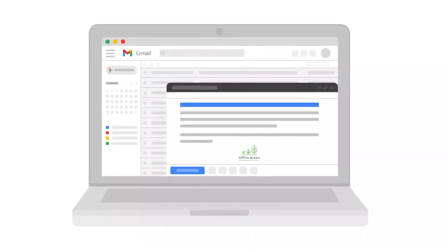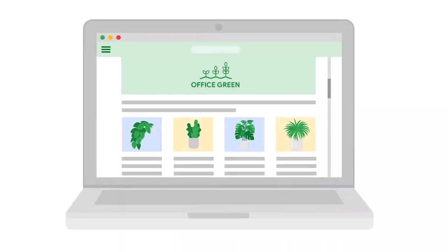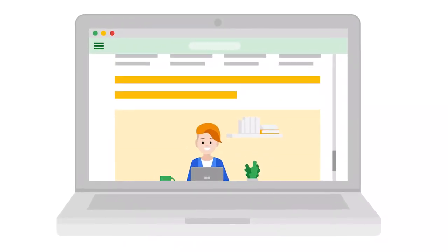Take the goal to improve customer response time. A deliverable for that goal could be the creation of email templates for responding to typical questions. Your office screen project goal to increase revenues could have these two deliverables: launching the plant service and a finished website that highlights the new kinds of plants being offered. These are considered deliverables because they describe tangible outputs that show stakeholders how additional revenues will be generated.